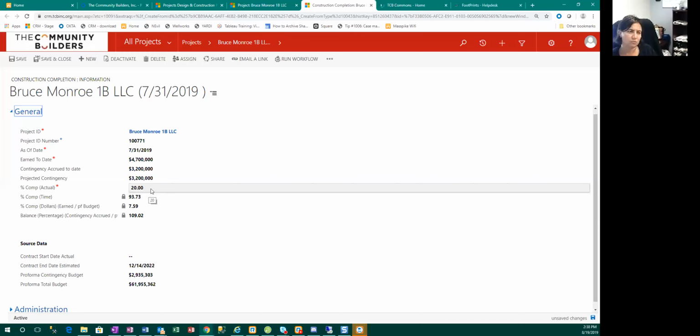So for instance, say the data is right, he's 7.59% in terms of dollars, but he should be 93% in terms of time. You know that there's something wrong there, right? And so you guys can start to check this because it's going to do the calculation against the actual contractual time with their draw schedule, and it'll help you say, yeah, that's about right. It's never going to line up exactly because you'll have pre-purchase of equipment or stored materials that's going to drive up the draw, but their percentage completes will be lagging until we get to the end.